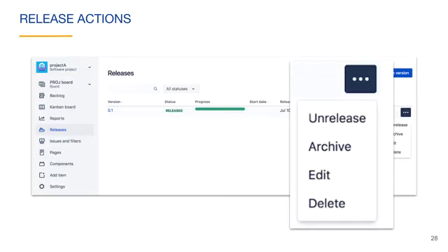Edit allows you to change the metadata related to the version. Delete removes the version. You must choose what happens to the issues of the version. You can either move the issues to a different version or simply clear the fixed version value for the issues. This does not delete any issues.